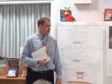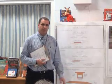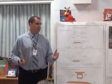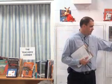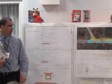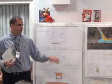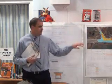A couple things that we have to work through. Right now, the environmental agencies are looking at a July 15th to September 30th work window, which is the time frame to work in the box. That's the critical piece of this project as far as construction goes. Obviously, we've got to dig a trench across Route 111 with the high volumes that we have. Can we get an open work window for the project? What that means is, can we work year round and not impact the fish and other things we're trying to work around in the stream? So that's a couple things that we have to work around.